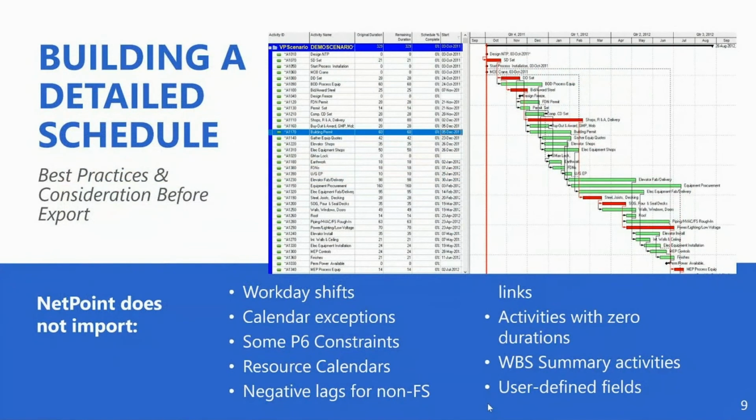So again, when you have a detailed schedule in P6, you should be aware that if you bring it into NetPoint, NetPoint does not really support any workday shifts. If you're bringing in a schedule as a day schedule in NetPoint, it will end up having 24-hour workdays, and any workday shifts will be ignored on the import. NetPoint also does not support calendar exceptions, which is basically any non-working day which is converted to a workday. There are certain P6 constraints that NetPoint does not support, and those are simply ignored on the import.